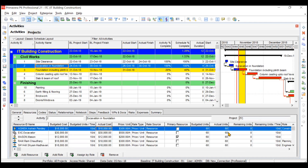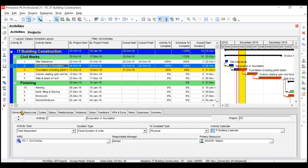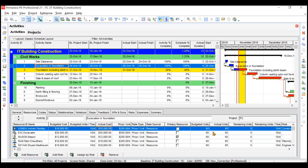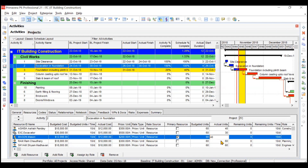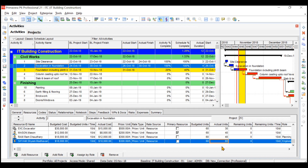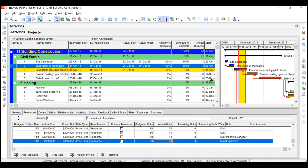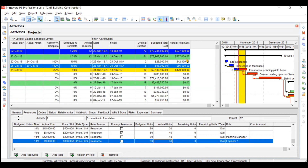Similarly for the second activity, you need to update actual units — they will not change automatically due to Fixed Duration and Units type. The actual duration for this activity was four days but planned for six days, so the units consumed will be lesser. Update the resources: 40 hours, 30 hours, 40 hours, and 40 hours, then 30 hours for the last resource. Going to the last column shows the actual total cost is now less than the budgeted cost because the activity finished ahead of schedule.